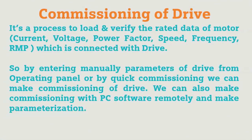Now we'll see the commissioning of the drive. Commissioning is a process to load and verify the rated data of the motor — like current, voltage, power factor, speed, frequency, or RPM. We enter this data based on the motor and commission the drive. You can commission manually with the basic or intelligence operating panel, or connect PC software to the drive and perform automatic parameterization remotely. In the next video we will see how to commission the Siemens G120 AC drive with the intelligence operating panel and from the Starter software.